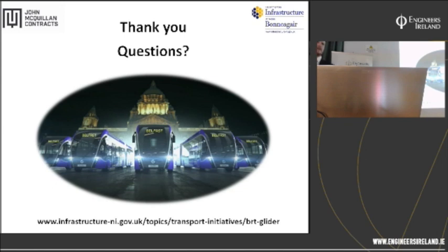The department works with the utility contractors through NAROC and at a divisional level through DROC committees. And as part of the BRT project, I provided the DROC committee with regular updates on what we would be doing within BRT in the year and in the coming years, to try to forewarn them of this work coming up and give them the opportunity. A positive example would be NI Water took the opportunity along the section of the Upper Newtownards Road from Albert Bridge Road to Sandown Road to replace all their old lead connections to houses as we were running through. Now, the BRT principal contractor might not thank you for that amount of additional works, but I would say the public probably would, in saving time later on.